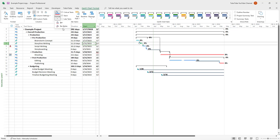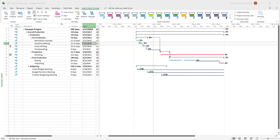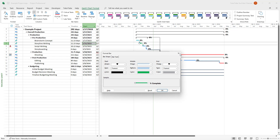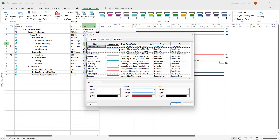You can go to 'Bar Style'. With 'Bar', only the selected task bar changes its format. But if you want to change the format universally, you can go to 'Bar Styles'.